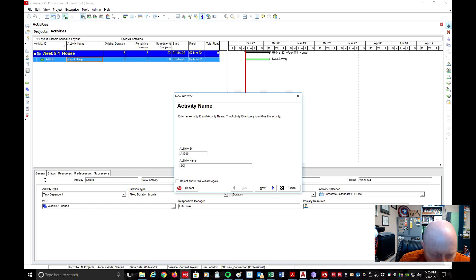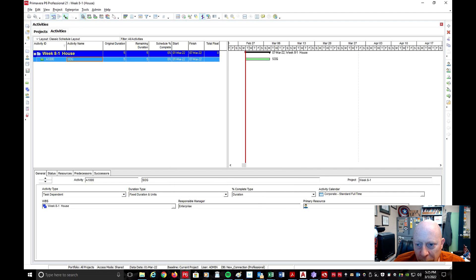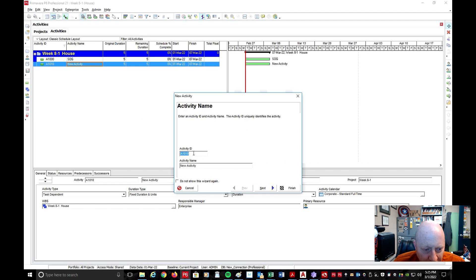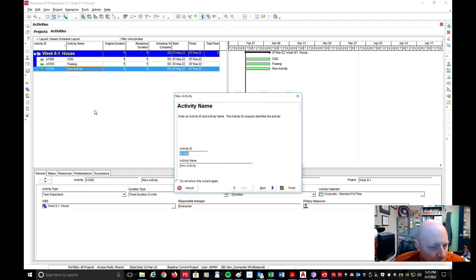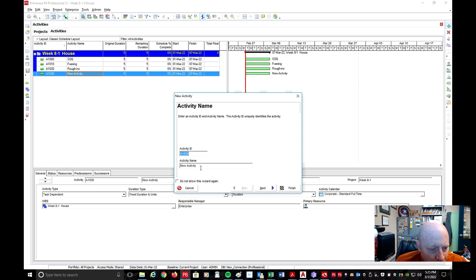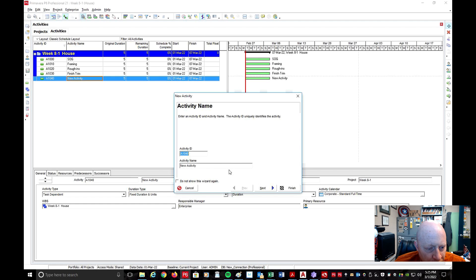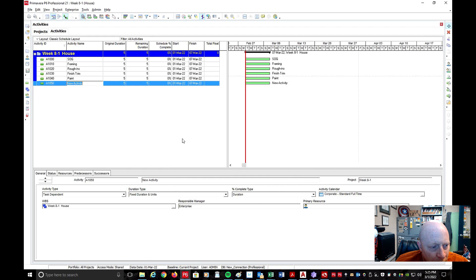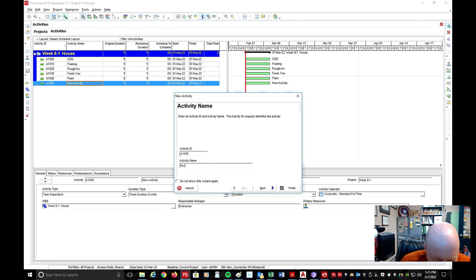I'm going to call this SOG for slab on grade. Hit Finish. I'm going to add another one — I'm just keeping the activity IDs as default, which is the easiest thing to do. So this is A1010. The next one will be Framing. I'm going to add another one — this activity name will be Rough-Ins. Then add another one called Finish Trim. Add another one and we'll call it Paint. And then one more — we'll call this Punch List.